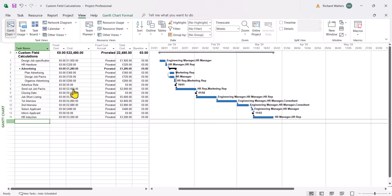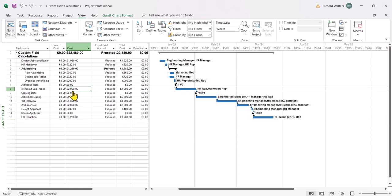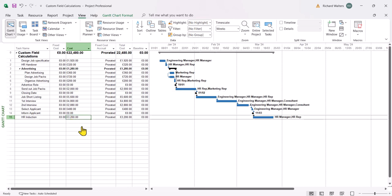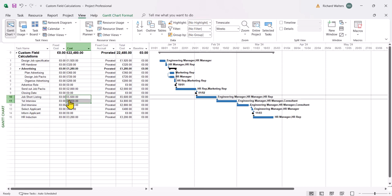If anything is 2,000 up to 4,000, so 2,000 to just below 4,000, so this number here and this number here, we're going to say that's an orange. We need to look at that cost. Anything that's 4,000 or more we're going to say that is a red color.